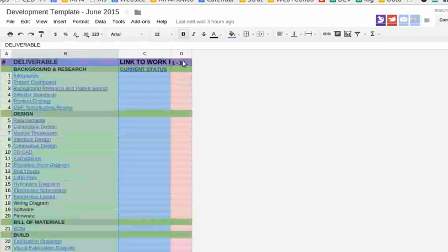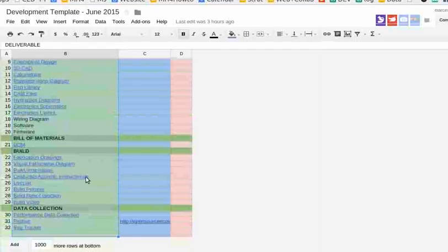So that's summed up over the entire column D, and a percentage of completion is generated as a result of looking at the status of completion. For example, if you think the 3D CAD is completely done, typically the project manager for a group would type in the level of completion. When it's done, write a 10. If there's nothing, you can even keep it blank, or if one line has been written or one little piece of content, type 1 or whatever, so that you can track the state of development of a given step. Okay, that's the basics of the development template itself.